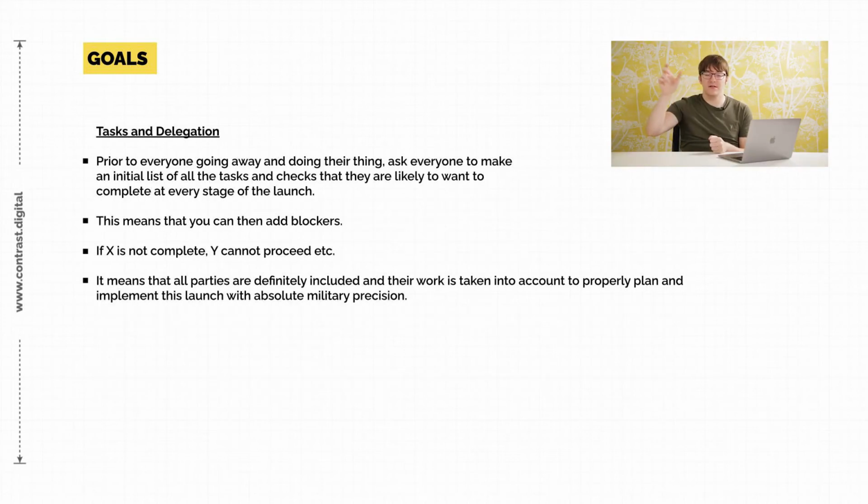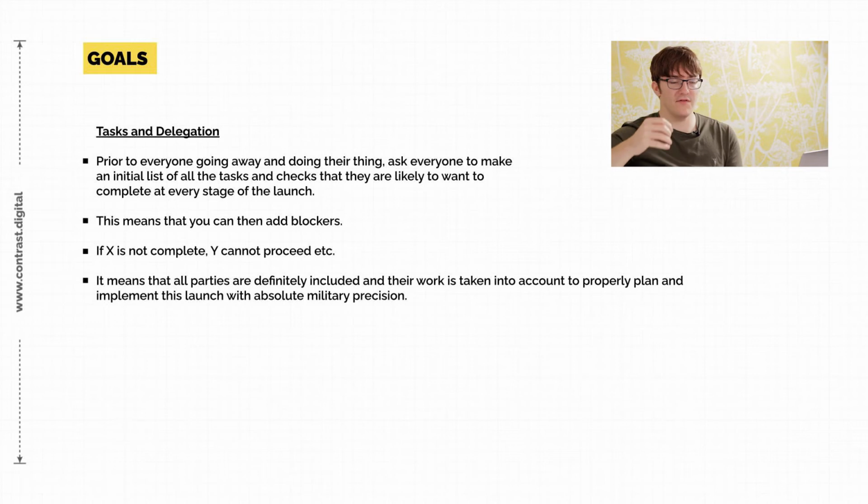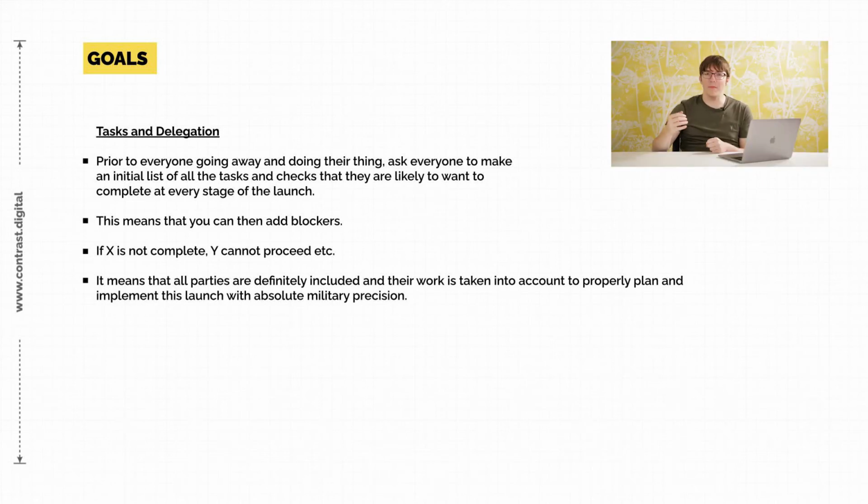As we've talked about these timelines, they will probably then be broken down into individual tasks that need to be completed. And again, everybody can then go away and make sure that they get their bits done. There'll then be reviews to make sure everything's fine and signed off before we move on to the next section. Again, we'll probably do some internal meetings for asking questions and overcoming blockers, so we understand, we can't do X because Y hasn't been done yet. Then obviously we try and mitigate those and put solutions in place to push this forwards.